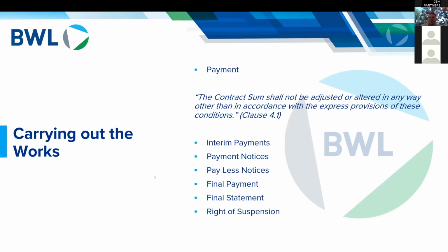If you, as a developer, don't actually pay your contractor, then apart from other remedies that are available, for example, adjudicating to get the money, you also have, under section 112 of the legislation, a right of suspension. So the contractor has a right to suspend operations on a site on the expiry of a 7-day notice.